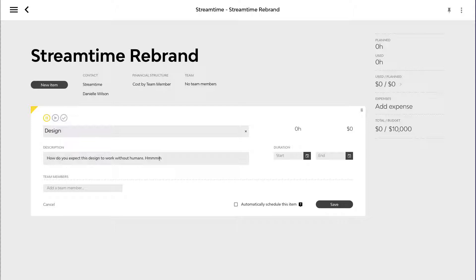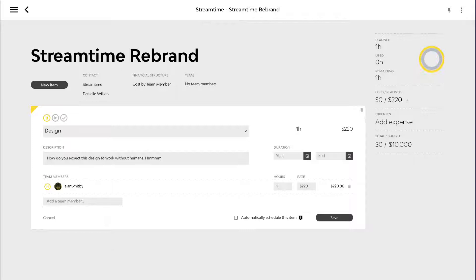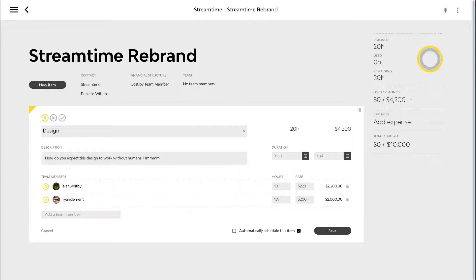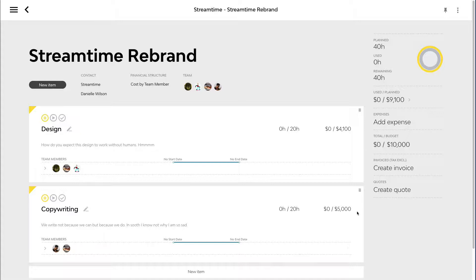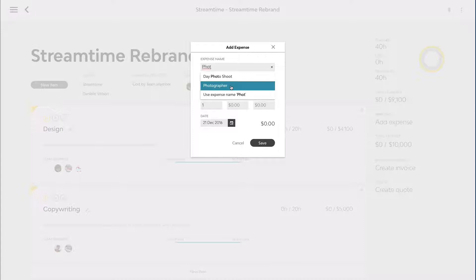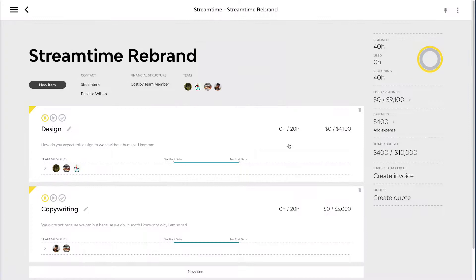Jumping back into our job, we can go through and start adding all the items. We don't necessarily have to have a start and end date just yet — this is at a planning stage. But we are going to put in some team members. I'm going to put 10 hours worth for Alan and 5 hours for me. We also have an expenses area down here — anything that's going to be a third-party expense can be added to the job. I might add some photography work — 2 hours, costing us $50, and we'll charge out $200. So that's building our job plan.